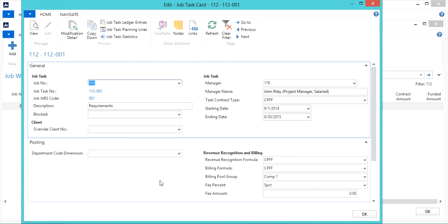You'll see that the task card has the same setup fields as the job card. The values in these fields were defaulted from the job card, but they can be changed here. When generating an invoice or calculating revenue recognition, the values on the task card will be used.